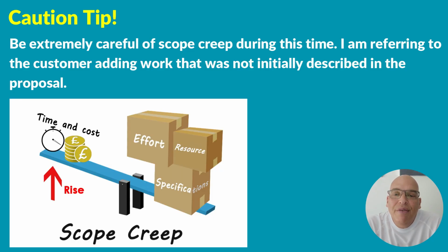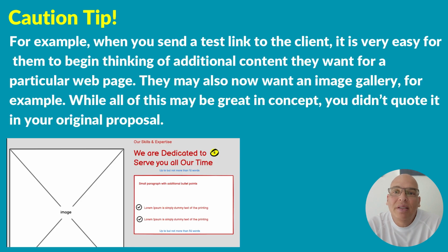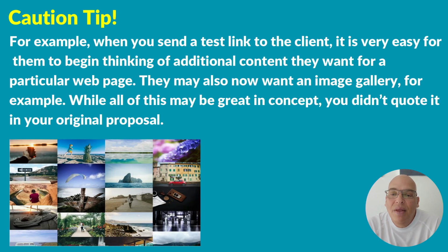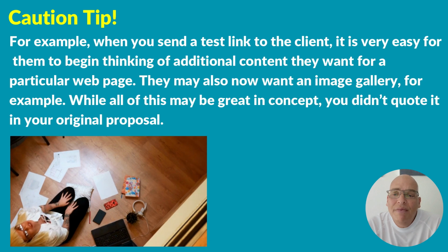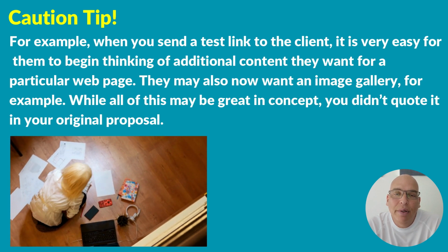Be extremely careful of scope creep during this time. I am referring to the customer adding work that was not initially described in their proposal. For example, when you send a test link to the client, it is very easy for them to begin thinking of additional content they want for a particular web page. They may also now want an image gallery, for example. While all of this may be great in concept, you did not quote this in the original proposal.